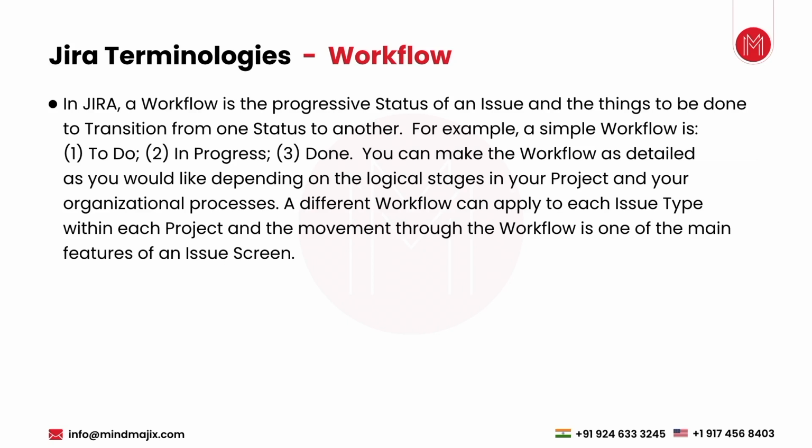First is the product backlog, and then tasks were picked up from the product backlog which needed to be done, and then in progress was there. In progress had a lot of statuses: it is in progress, then it was in a development phase, then testing, and post testing it was done. So it says that a workflow can be designed and determined according to our need.